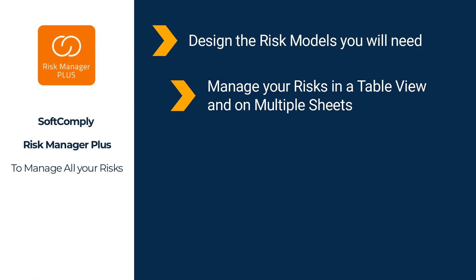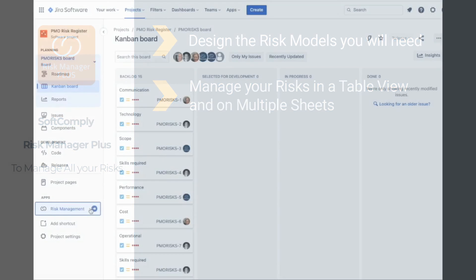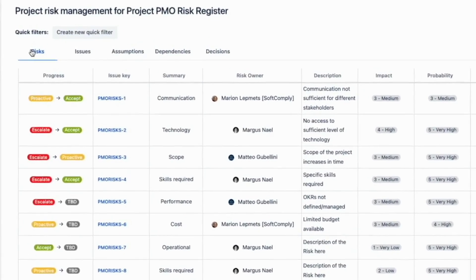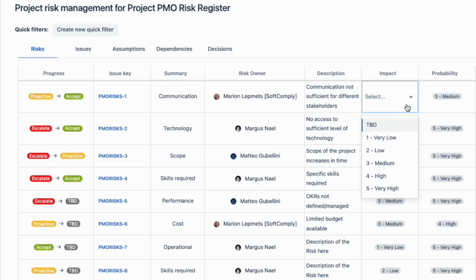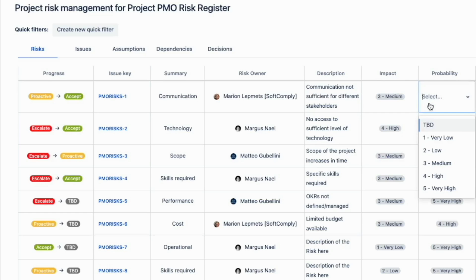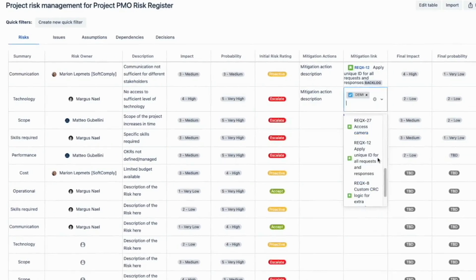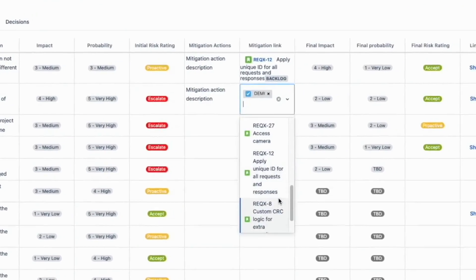The next step is to start working on your risk assessment. You can work with all your risks using a spreadsheet view — the risk table. You can add multiple sheets to your table view and connect each sheet to a different risk model. You can describe your risks and assess them based on your risk characteristics, and you can link a risk to any other project in your Jira to track the completion of mitigation actions.